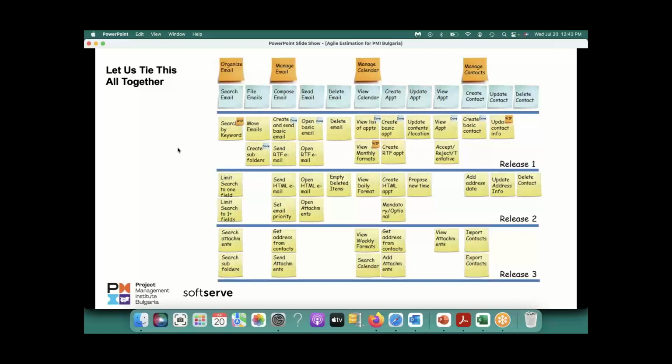And then you start your sprint. Okay, and as you are doing that sprint, those 2 weeks, you pick more stories from the backlog for your third sprint and start grooming those. So you don't have to do everything upfront. You do as you go. So at any point of time, the best practice is that you should have stories ready to go for at least 2 sprints. So if your first sprint velocity is 30, then probably 60 story points worth of stories ready before you start your first sprint, and then you adjust as it goes, because you're a learning team. You are a continuously improving learning team. So you do that. So no, you don't have to do all. You do as you go.